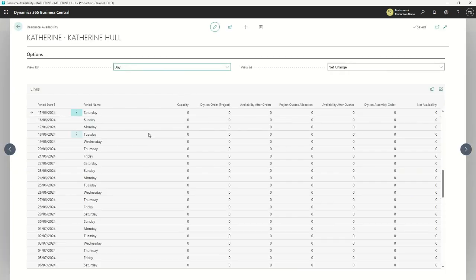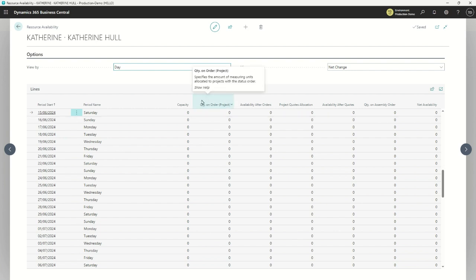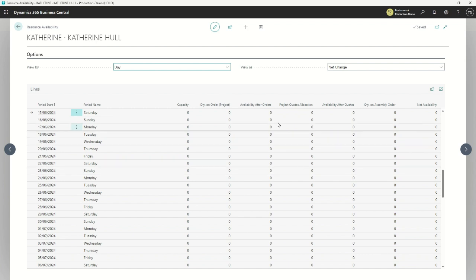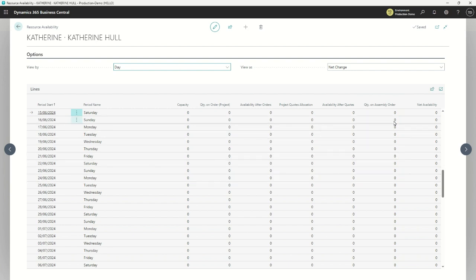Let's have a look at Catherine's availability. I've set this up by day for 2024. If I had eight hours per day available Monday to Friday, I could see how much of that is already on projects for these dates, how much time she has left after subtracting what's booked, and if I've got project quotes with Catherine's name on them, how many hours are quoted per day and what availability remains if those quotes are accepted and become full-fledged projects.